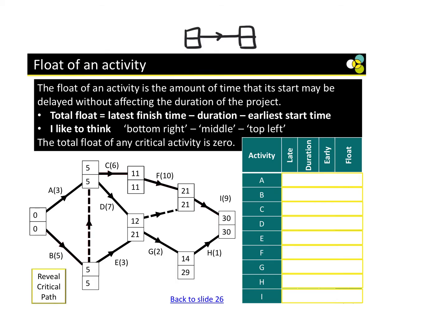Are we ready? So let's say we have our activity A. We look at the event times before and after, okay? So we're going to do this. Watch this. This one, okay, which is our latest finishing time, minus how much the critical activity is, minus our earliest start time, okay? So we're going to go backwards like this. So for example, you can write this down, but I just find it easier. For A, we're going to do 5 minus 3 minus 0. What do we get? 2.